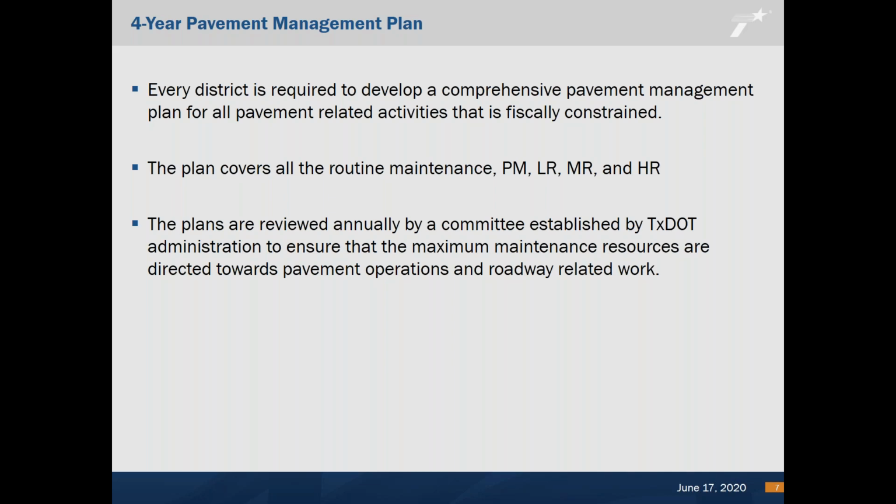Every district is required to develop a comprehensive pavement plan for all pavement-related activities. More importantly, this plan is financially constrained for the future 4 years. The plan covers all the routine maintenance, preservation, light, medium, and heavy rehab.